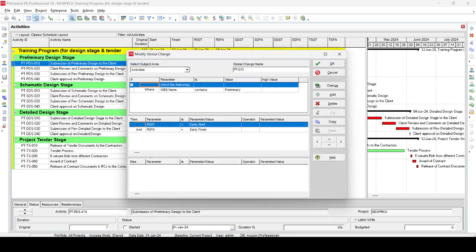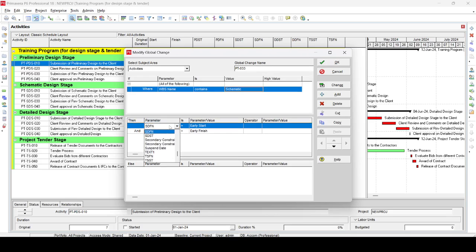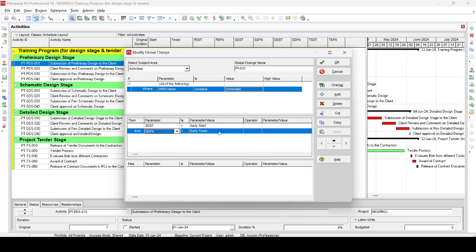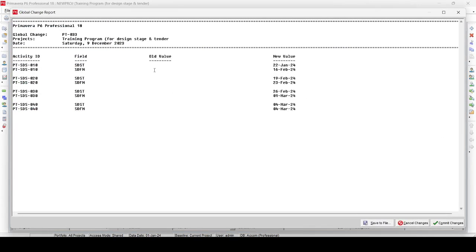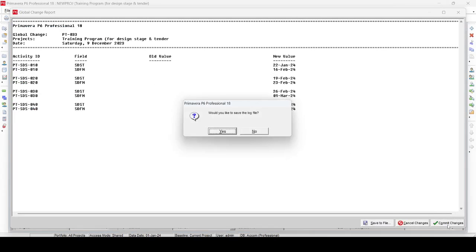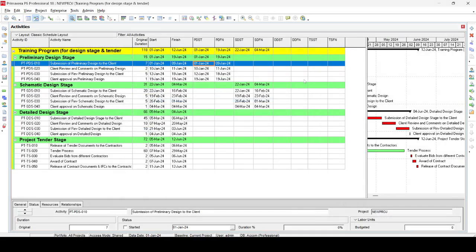Similarly, go to Tools, Global Change, then Modify again. This time the condition is: if WBS name contains 'Schematic,' then Schematic Design Start equals Early Start, and Schematic Design Finish equals Early Finish. Apply changes, proceed — all old values are zero/empty and new values are shown. Commit changes, skip the log file. You can now see the schematic design dates populated: 22nd January, 16th February, 4th March.